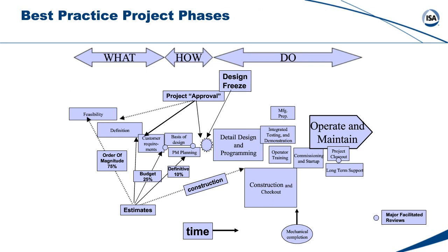The ISA phase approach to project management and project execution is centered around the belief that sequential project phases allow the work to be managed and completed best when specific groups of tasks are completed prior to downstream tasks beginning. Some overlap in phases is expected, but the phased approach dictates that the feasibility and definition phases be completed before the how phases are begun.